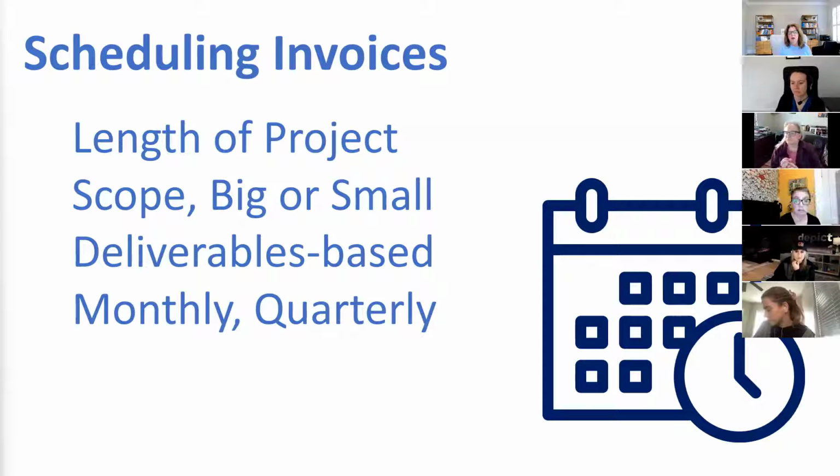And then sometimes you might have a client who wants your invoices tied to deliverables, right? So you can only bill when you've done a specific task. In almost 20 years in business, I've only had one of those. And then you might think about whether you want to invoice monthly or quarterly. That may depend on all of these things, right? The size of the project, the length of the project.